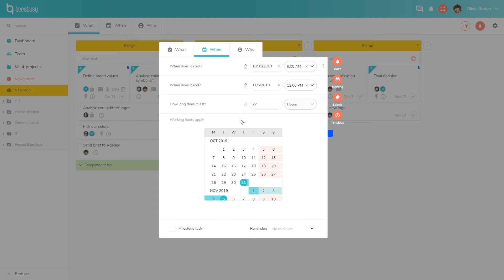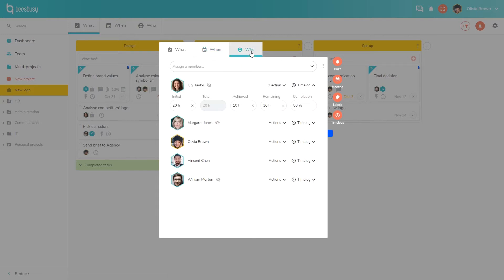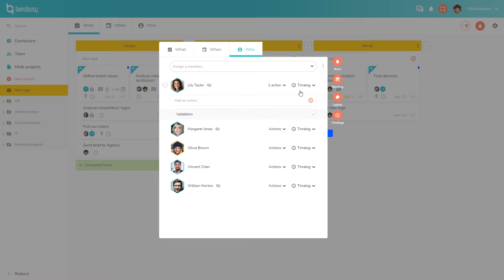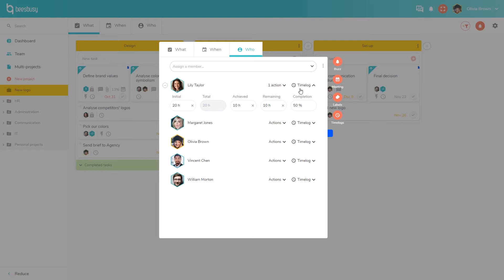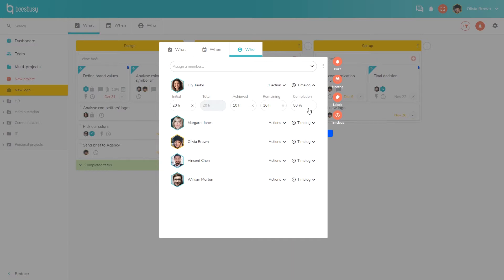In the Who tab, you can assign members and for each member add specific actions. You can also track time and thus separate the task duration from the workload, and specify for each participant the initial intended time. Then the members can add their achieved and remaining time. Then the total and progress will be automatically added.